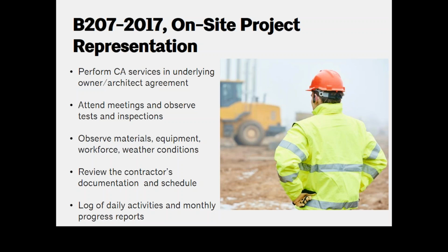non-conforming work. And I can think of at least one case that I worked on when I was doing litigation where monthly reports like this were a huge value to a client that I had as an owner who was trying to go back and prove up a case against a contractor that had quite a few construction defects that led into a lot of water infiltration and water issues on this project. So those kinds of things can be very helpful in keeping an eye on the project, but also can be helpful in asserting claims later on.